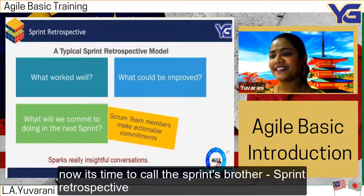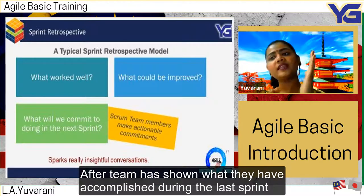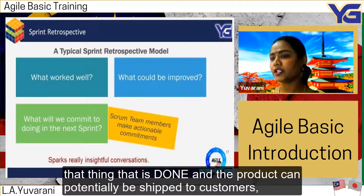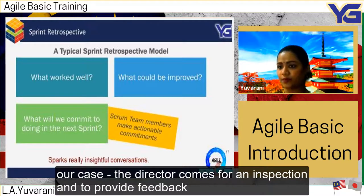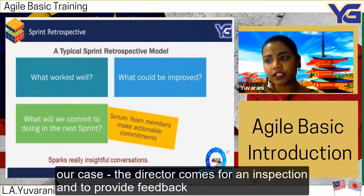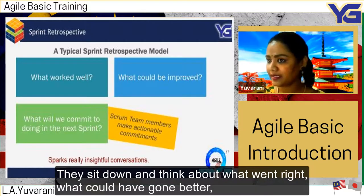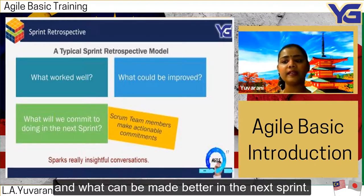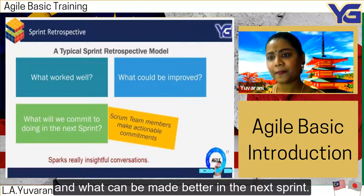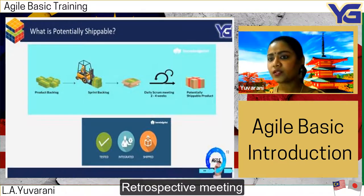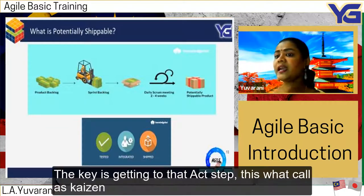Now let's talk about the sprint retrospective. After the team has shown what they accomplished during the last sprint — the things that are done and the product that can potentially be shipped to the customer or director — they sit down and think about what went right, what could have gone better, and what can be improved in the next sprint. This leads to the retrospective meeting, which drives continuous improvement — what we call kaizen — changing the process to make it better each time.